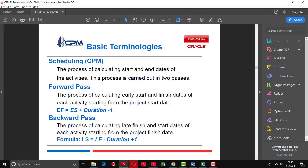Scheduling is a process of calculating the start and end dates of activities. This process is carried out in two phases. Forward pass is used to calculate the early start and finish dates of each activity starting from the project start. Its formula is: early finish equals early start plus duration minus one.